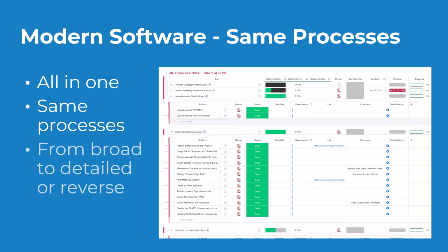You may be doing this top-down, starting with your highest level work breakdown structure component, or you may already know that a particular team or a particular person is responsible for task X in December, so you'll put this in as a scheduled task at the very, very lowest level, and then you work backward from there toward your work package. But in the end, everything, your scope, WBS component activities, attributes, and assigned tasks from the schedule, they will be interlinked and they form a hierarchical structure.